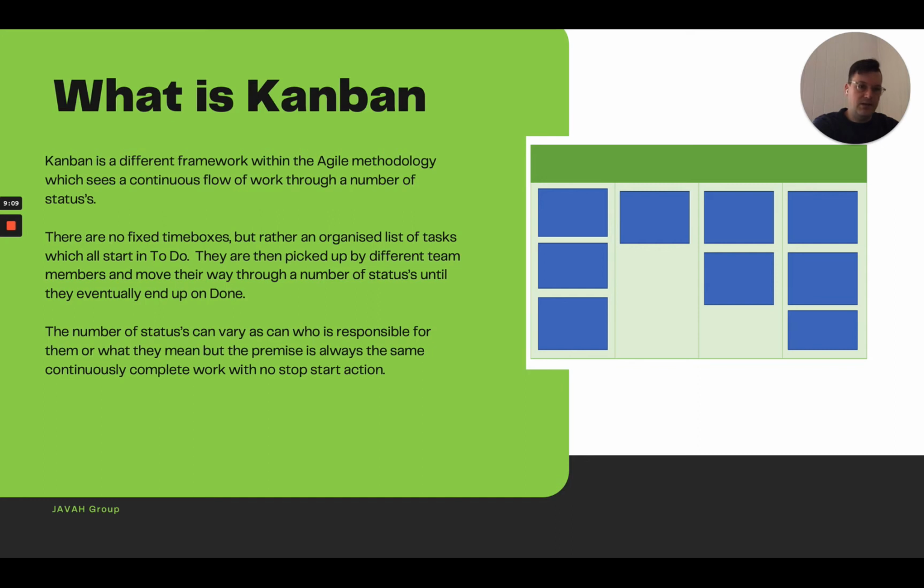We're bringing them in at the start of a 2-week iteration, they call it a sprint, a time box. We're bringing it in at the start of that and deciding what the goal would be. We're working towards that goal, and at the end of that time box, we're deciding: have we passed, have we failed, how did it all go, doing the retrospectives, having the showcases, and all those sorts of things. So you can run multiple within the same business, that's no issue there.